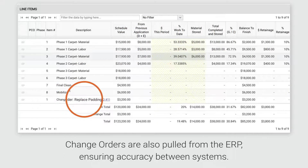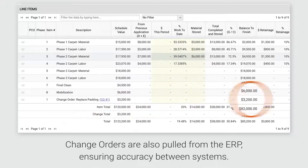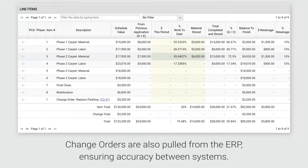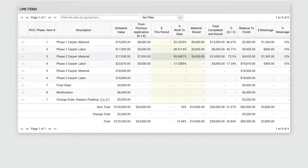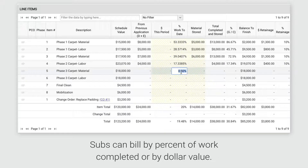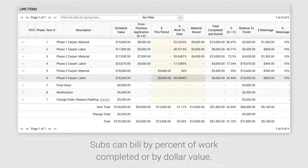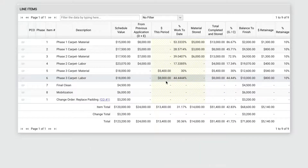Change orders are pulled in from your ERP, ensuring the schedule values in GCPay are always in sync. Subs can bill by percent of work completed and GCPay will automatically calculate the dollar value, or they can bill by dollar value and GCPay will calculate the percent.